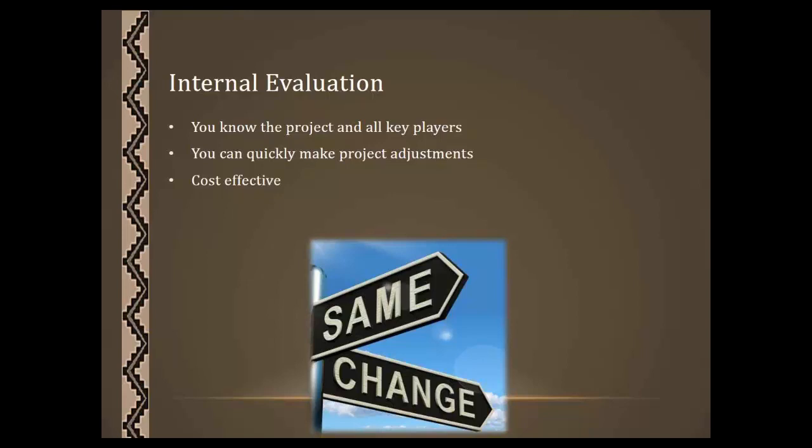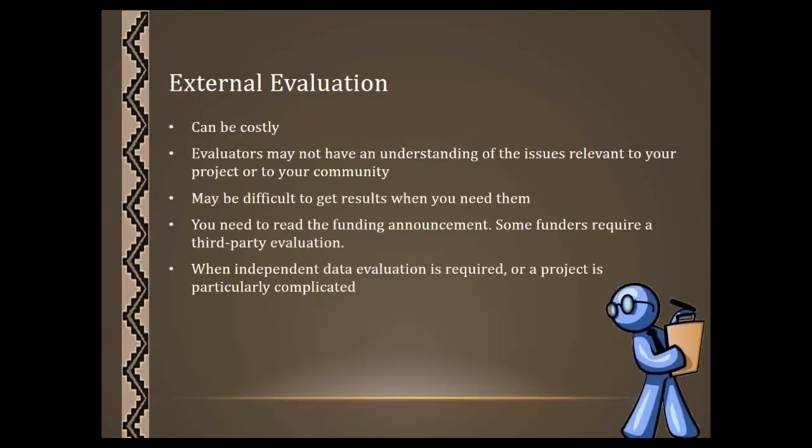It's cost-effective because project staff are implementing the monitoring and evaluation. And actually, ANA would prefer that you conduct your evaluation. As a matter of fact, the Sustainable Employment and Economic Development Strategies, or SEEDS FOA, actually states that you can't use project funds for an external evaluation.